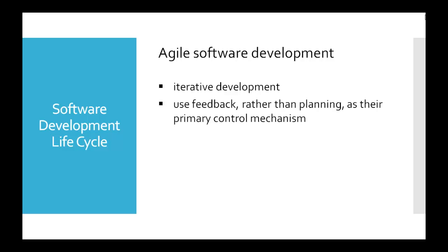Agile model is based on the adaptive software development methods, whereas the traditional software development lifecycle models like the waterfall model are based on a predictive approach. Predictive teams in the traditional models usually work with detailed planning and have a complete forecast of the exact tasks and features to be delivered in the next few months or during the product lifecycle. Predictive methods entirely depend on the requirements analysis and planning done in the beginning of a cycle. Any changes to be incorporated go through a strict change control management.